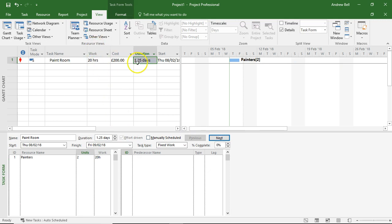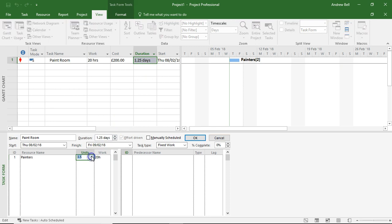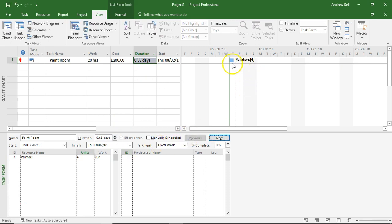So now I put two resources on the task. The duration has reduced to 1.25. Now, let me put four resources on the task. The duration decreases again. It says I've got four painters on this task. It's taking 0.63 of a day.